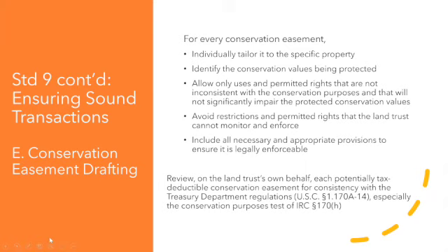And so just something you may hear about is folks sending the document to the state and waiting for the state to get back with it. It adds, for one thing, it adds weeks, if not a couple months, to the process. So that's something to be aware of.